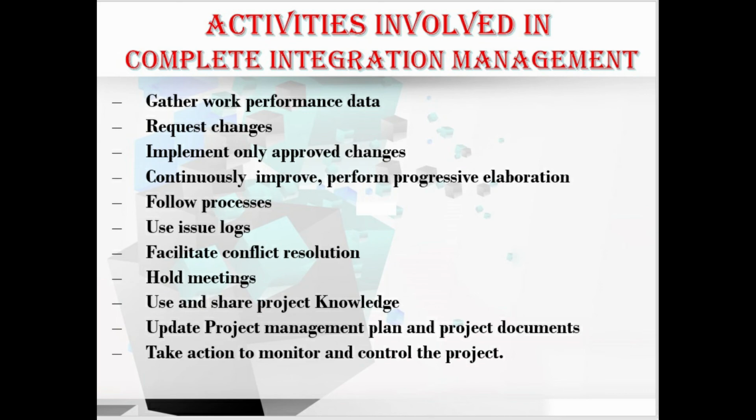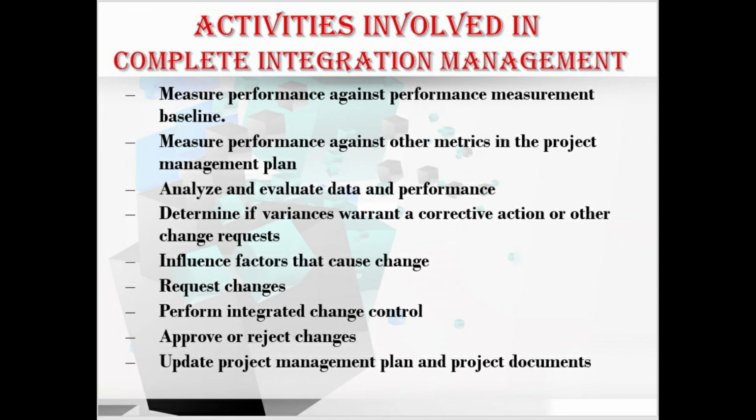the project, and we need to measure the performance against the performance measurement baselines, and we need to measure the performance against other metrics in the project management plan, and we need to analyze and evaluate the data and performance, and we need to determine if variances warrant a corrective action or any other change request, and we need to influence the factors that cause the change, and we need to request the changes if required, and we need to perform the integrated change control, that is PICC, and if required we need to approve or reject the changes, and